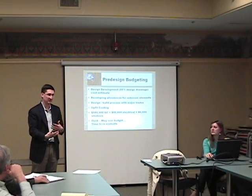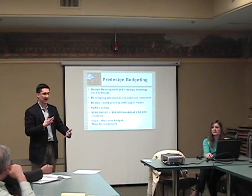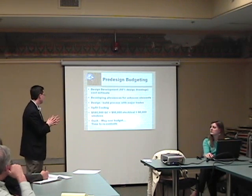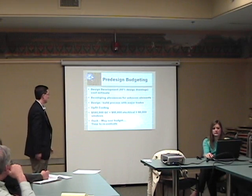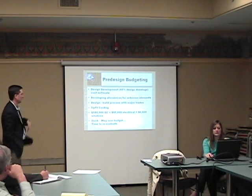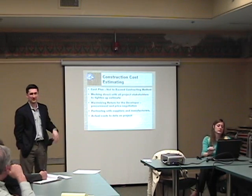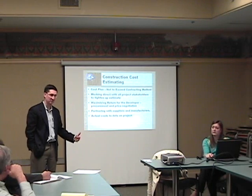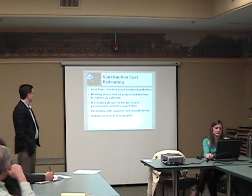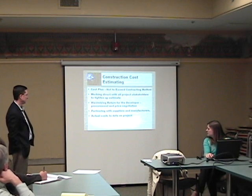A lot of times at 65%, there's a little guesswork put into what it's going to be like when the project finishes. You add those factors in, you take out factors that they might have missed. Once we finished the 65%, we sat down and went into a design-build format, where we worked directly with all the trades and developed a cost plus, not to exceed, with the benefits of a guaranteed maximum price: getting the actual cost plus an overhead and profit mechanism, the plus part. We worked directly with all the people that were part of this project to tighten up the estimates.